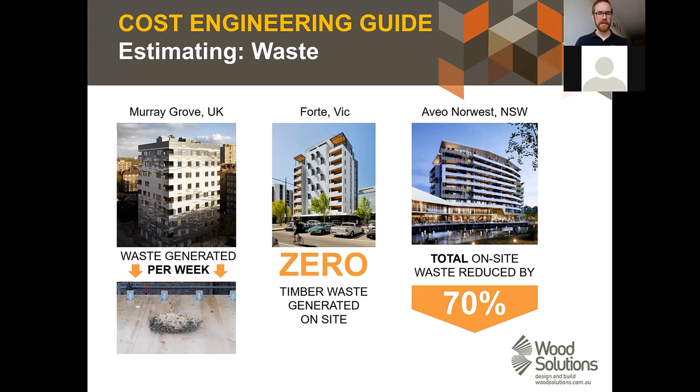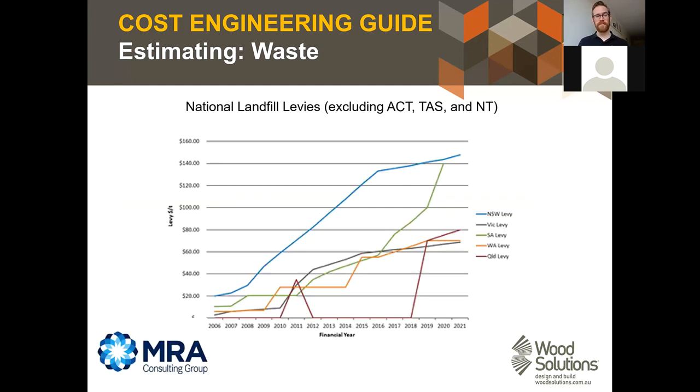And this has been continued on sites locally as well. So it's not just a one-off project thing. We really need to reassess our tipping costs when we're looking at timber projects. This is also really important when we consider the actual cost of tipping waste in Australia. You can see here, this is a nice chart which charts the growth of landfill levies in the various states over the last couple of years. And I think we can all agree there's a pretty steady trend here where those numbers are going up. And I think we understand logically that they're going to go up over time anyway, and much more than CPI. So if we can produce less waste in our construction, obviously from a sustainability point of view, it's better, but we also have the financial incentive now as well.